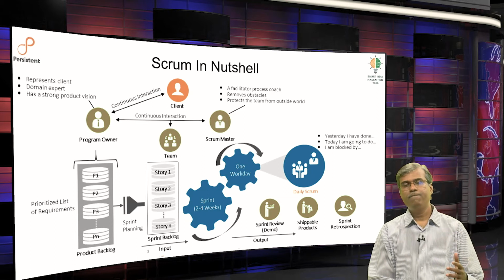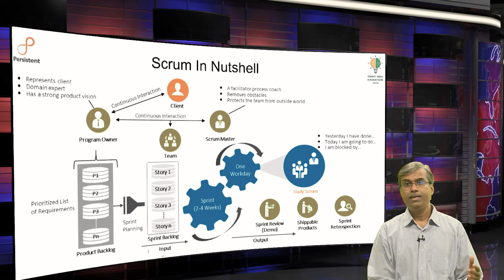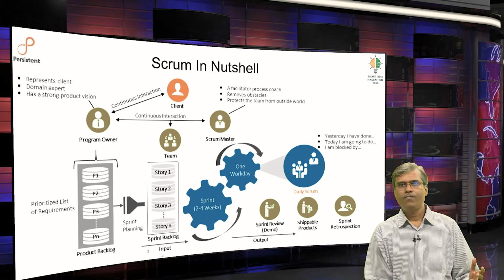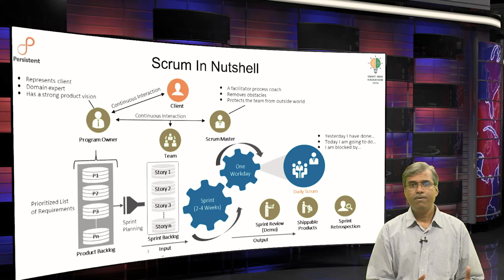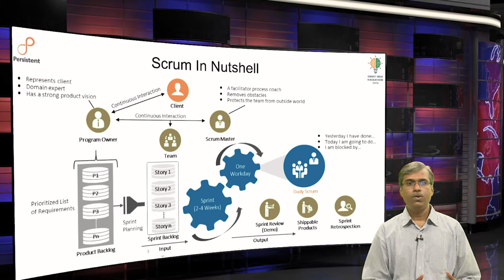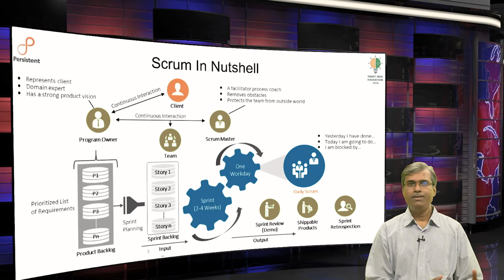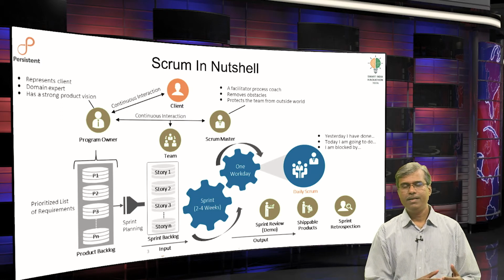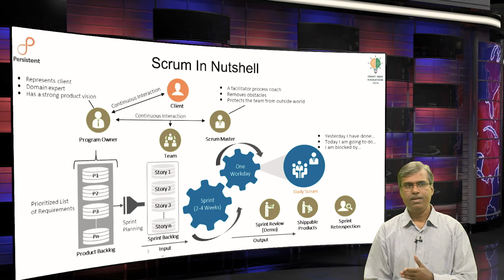All those are identified as roadmap items, and they sit in the product backlog, and these are the essential starting points. Now, the backlogs may or may not be complete at any given point of time, because we want flexibility, we want the backlogs to continually evolve, because the end users may not know what the entire set of requirements could be. So, we identify the requirements in a progressive manner, and as soon as we have a simple and important ones identified, we simply start processing them in an incremental manner.